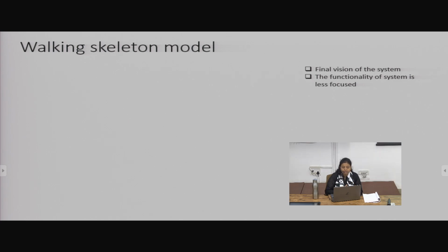And then when the basic step is done, I'll say, okay, now I'll think about the external structure, then I'll think about the seats, then the electric wiring, and then I'll be thinking about more and more features to reach the final process, right? So in the walking skeleton model, we keep on adding feature by feature. Slowly we keep evolving, adding the system components one by one.